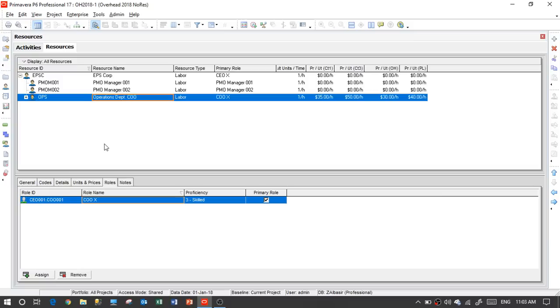And from a corporate perspective, we encourage the team to book on the overhead when they don't really do work on projects, just to monitor this. Of course, most of the people will try to avoid putting their time on the overhead and show themselves busy. But sorry, I don't agree with that. As a technical manager, I should monitor this behavior and give them the exact hours to book inside the projects. The other extra hours should go to the overhead.